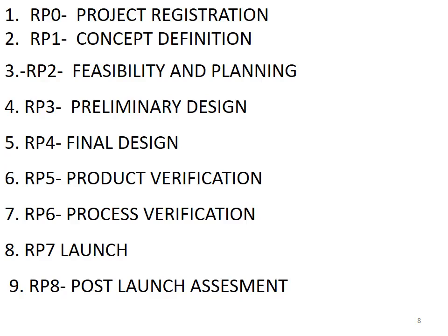So we have to demonstrate the product performance. So on the basis of the beta prototype, after testing, we have to demonstrate the product performance, initialize the field trials. So we put the product in the hands of customers and they can utilize it in their own environment, finalize design documentations, complete beta prototype and field testings, apply for regulatory approvals.